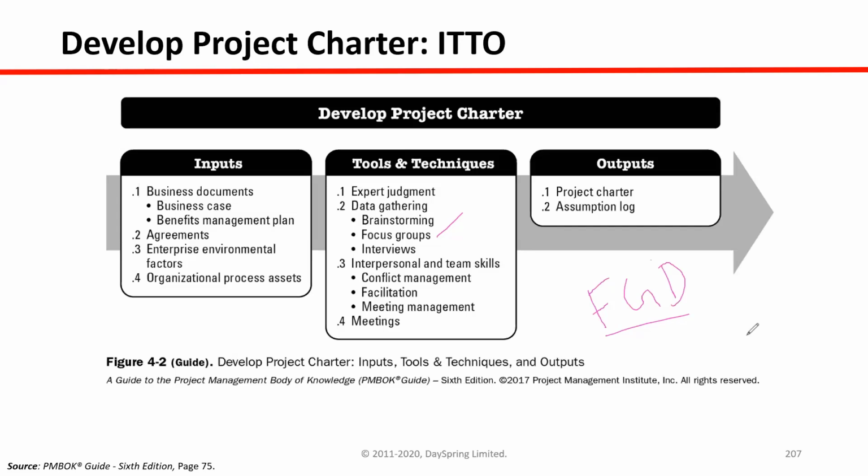bring together the experts who are expert on that focus area, on that focus topic. Say we are talking about poverty, or our kids' safe internet. Say we are talking about safe internet. What we will do is bring technology experts, then social experts, then those people who actually work with kids. Then there is a facilitator who conducts the whole workshop, meeting or discussion. So on one topic we bring together the same type of people to gather the ideas or the main points from the discussion. That is focus group meetings. This is a good way of gathering data to write the project charter.